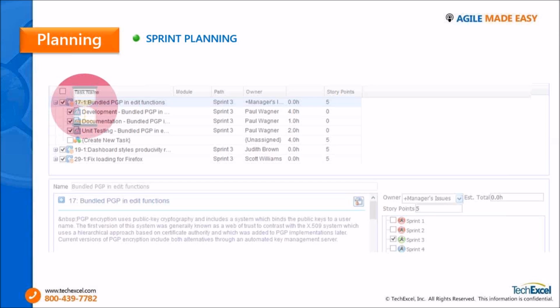Also, as mentioned, our release duration is about 3 to 4 months each, so that in a single year we could do 2 major releases and then 2 minor releases, which could be simple bug fix patches or minor feature improvements. The duration of the release, the 3 to 4 months, is also based on our experience.